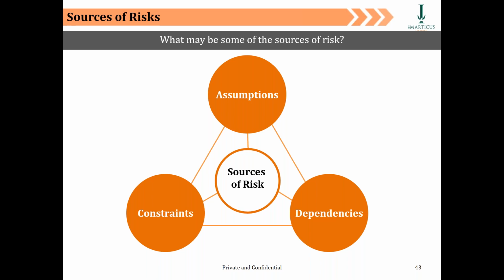Now, if you ask me what became my risk, I'll be very honest, guys, that during the requirement phase, I was involved with them, but after that, I never looked back at them. I never gave them a heads up on what kind of functionality we are developing to ease their life, what kind of solutions we are building to address their requirements. Somehow, the solutions that we built were so complex that the users just could not fathom it.